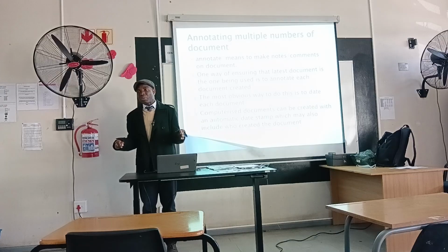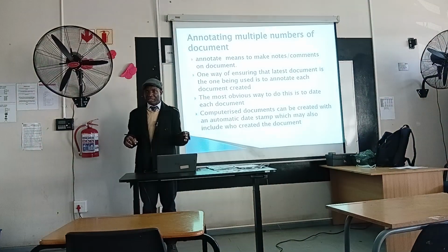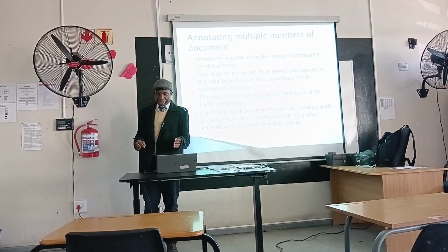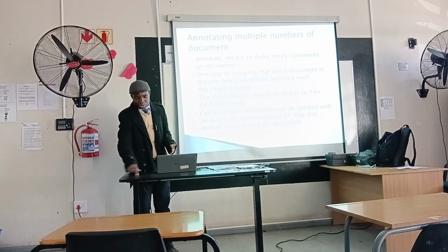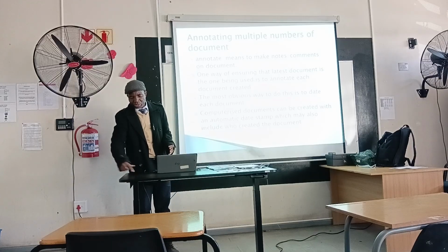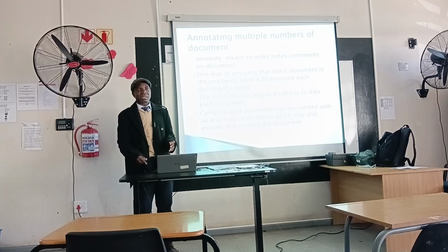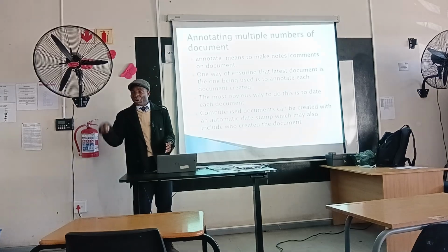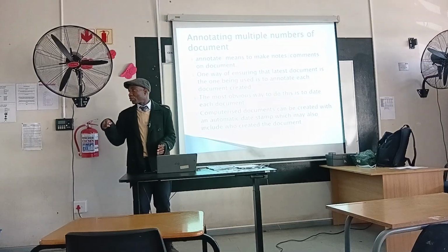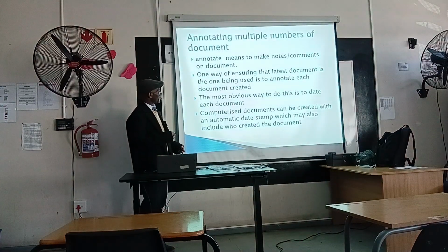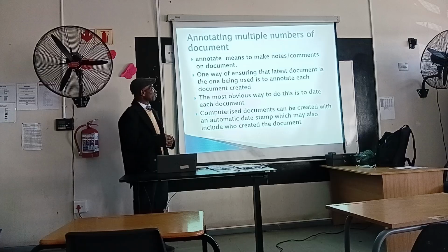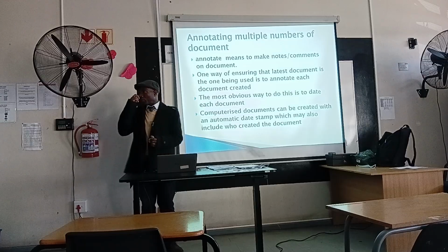If one was revised, then my boss would come forward and say, okay, let's put two lines, cancel it, and write superseded. That means it has been revised. We always have to make use of the latest document. So the most obvious way to do this is to date each document.